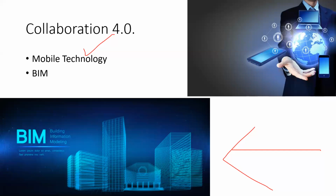With augmented reality, a project manager or contractor could walk through a construction site and easily view the overlay of the building information model on top of the as-built construction and compare the two. At the same time, they could be accessing checklists and completing a daily report using a head-up display. The project manager could instantly take photos or record the augmented reality walkthrough and send it back to the design team for clarification as issues arise. These are the various technologies, as per the recent development of Industry 4.0, which are being integrated in the construction industry.